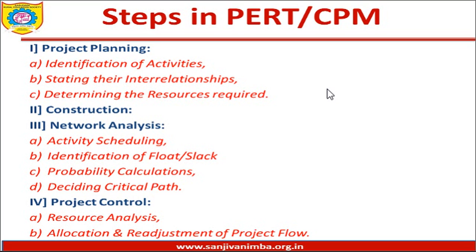What are the different activities involved, what is the time frame within which those activities need to get performed, what is their starting time, when the activity should get finished, what are the preceding and succeeding relationships among the various activities involved in the project. This is something that you'll have to understand, and based on that you have to draw a network, and that is nothing but the construction of a network. Then the third thing, once you are clear with this network, is you have to analyze the network.